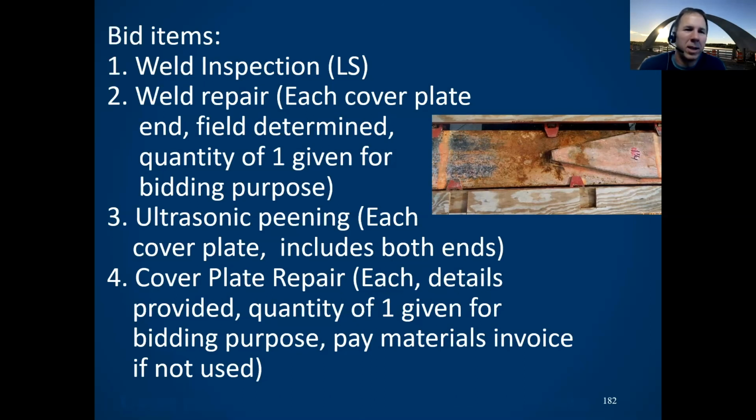The first thing is the weld inspection. The contractor is bidding a third party to come out and do ultrasonic testing or mag particle testing on these cover plate terminations. Within 1.5 feet of the end of the cover plate, they're supposed to give you a report. Are there cracks in those welds? You should get that report and include it in what you give to us in the bridge office for records.